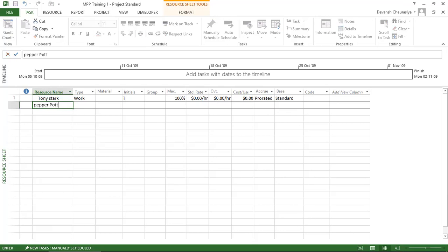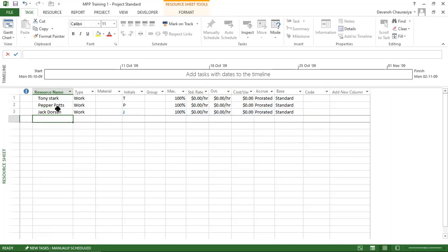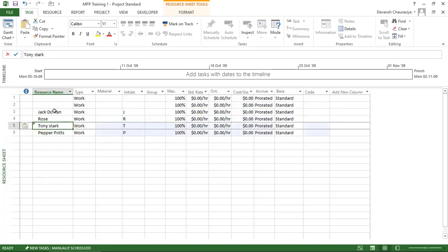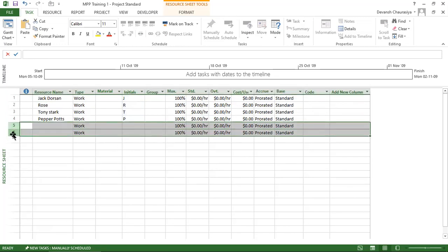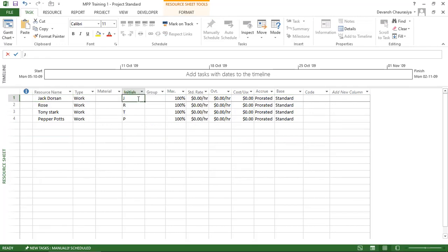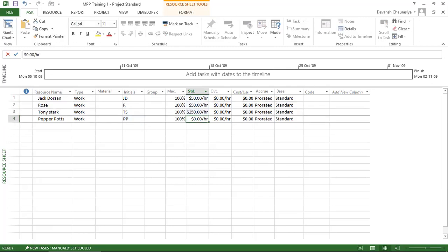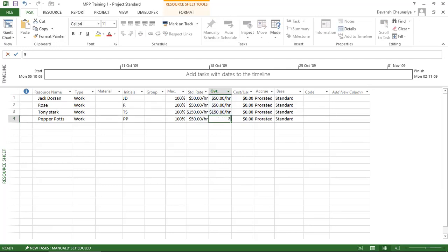In the Resource Sheet, you can define that each resource is 100% allocated. Standard rate for Jack Dawson is $50/hr, Rose is $50/hr, Tony Stark is $150/hr, and Pepper Potts is $150/hr. Overtime rate is the same as the standard rate. You can also assign a code such as 'full time worker,' 'contract worker,' or team groups like 'Finance Team,' 'HR Team.'